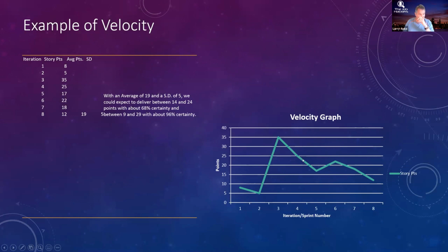Here's the interesting thing about this graph: it looks all the same for new teams, by the way. They always start out at the beginning. When you get a brand new team who's never done Scrum before, the first 2 sprints, you're not going to get much through the system. You know why? They've never done it before. This is also the period of storming, norming, and performing, which is Tuckman's rule, I believe is what it's called. It's going to take them some time to figure out how to get things through the system. They're not used to delivering every 2 weeks.